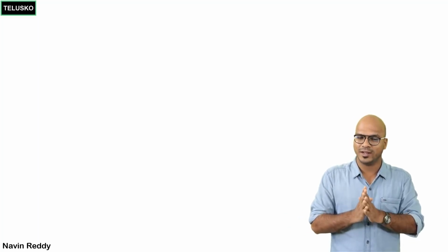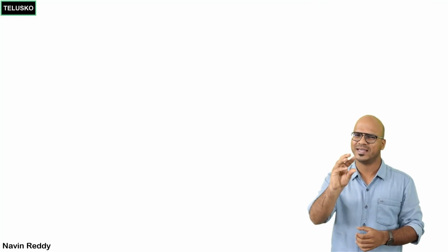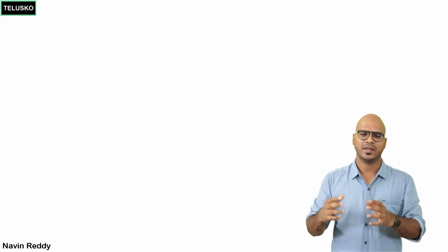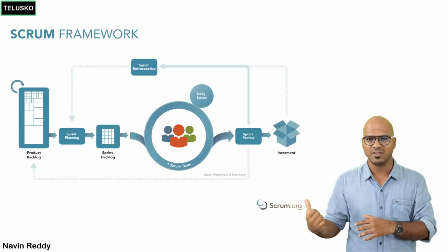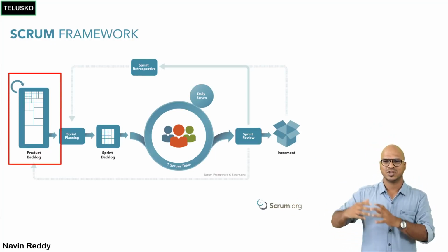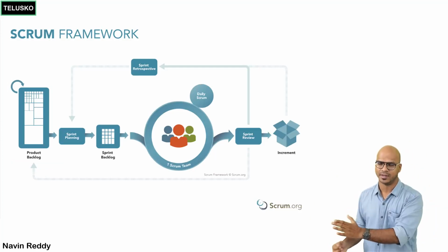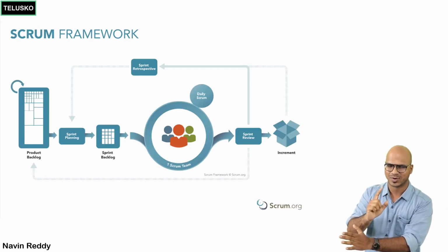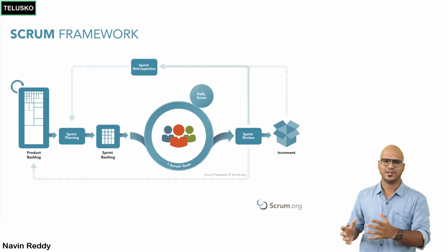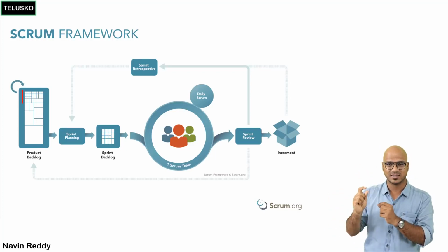So if you want to do that, what you will do is from the entire product requirement you have, you will take some requirements for each week, right? So to understand that, we have the first one here, which we normally call the product backlog. So we have the entire backlog here, which will have all the requirements from start to end. You can add requirements later as well, okay? It's not that it is fixed. You can add your requirements, and that's why you can see we have some small boxes there.